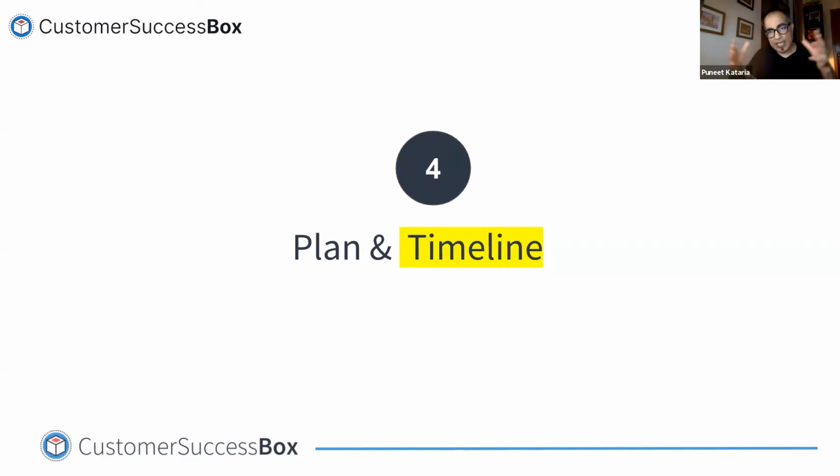Now, in that 8-week plan, there are obviously things that the customer has to do on their end. They have to provide you all the data. They have to provide you all the stakeholders. They have to provide you all the authorization. They have to work with you. They have to configure the systems, give you all data points, templates, data sheets in specific formats, all of those pieces, right? And if any of them is going to slip, that should have an impact. But I think there has to be a very clear connection: if any of these things are not possible within these timelines, then it is going to have an impact on the go live date.